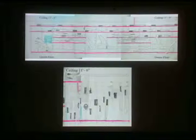Amy and Beth, assisted by their team, made scale renderings with a tiny image and the dimensions on each, as you can see here. They were placed onto the shelving and arranged and rearranged till we could fit everything into the space we were given. These large-scale plans, because these are big, this is like 24 inches, were then used by the shelving installers to secure the 4-foot by 4-foot shelves onto continuous rows of varying heights.